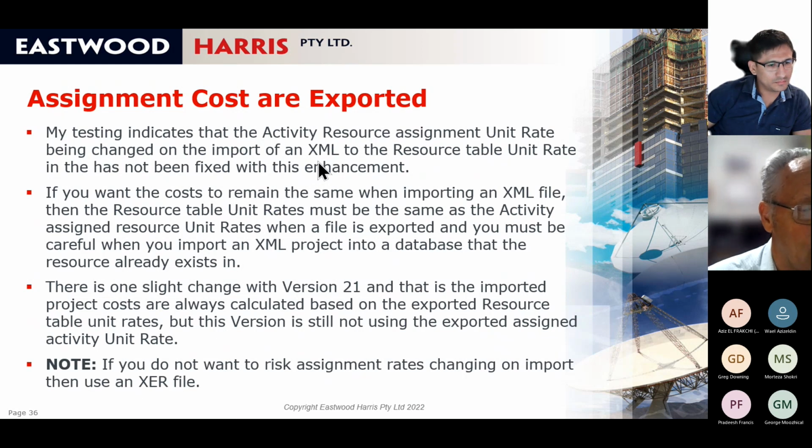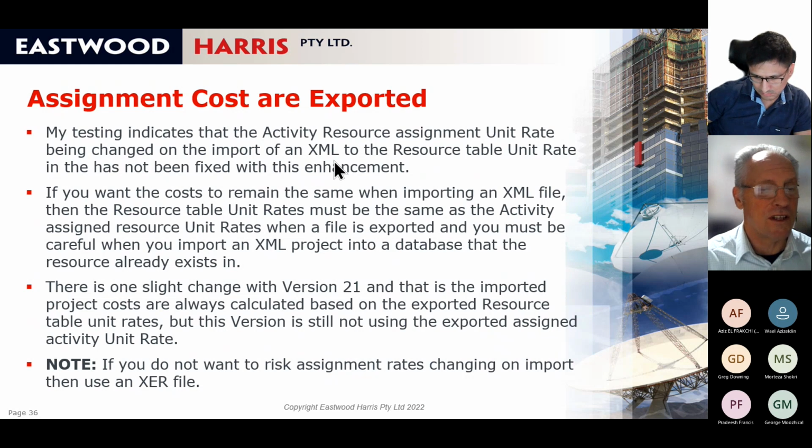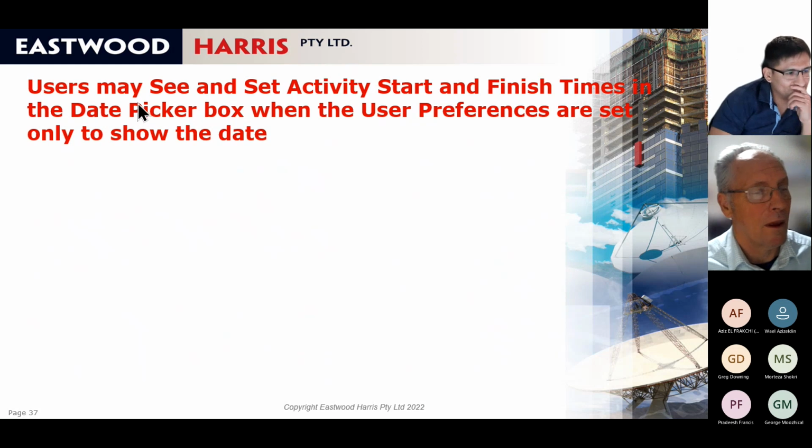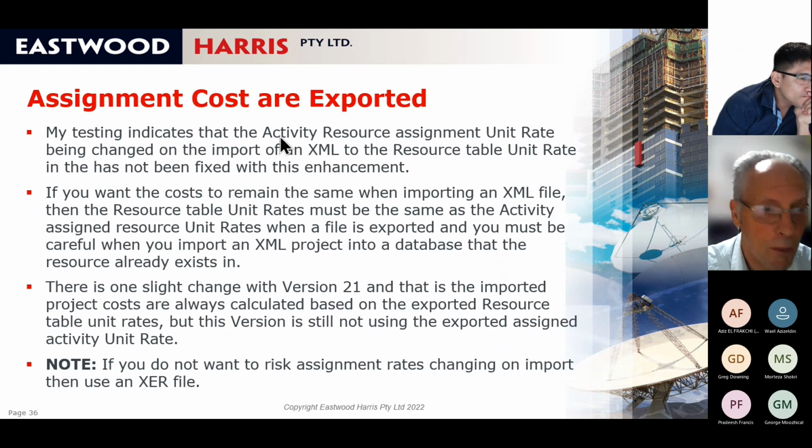But I recommend if you're using XML, and you have to with an EPPM database, you've got to make sure that you don't make the resource rate in the resource table different to that when you assign it to the task. And this is just a nightmare. So the next thing here, well, basically, I don't think they've solved the problem.